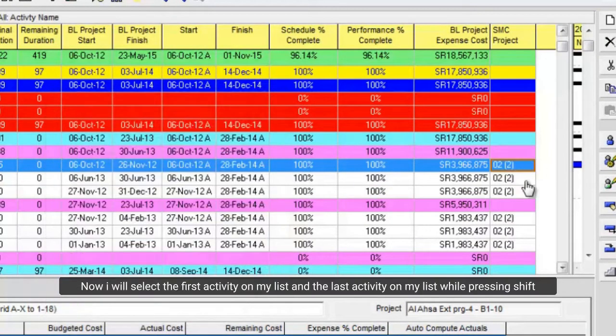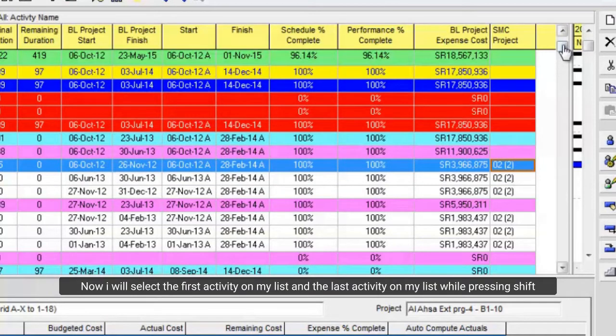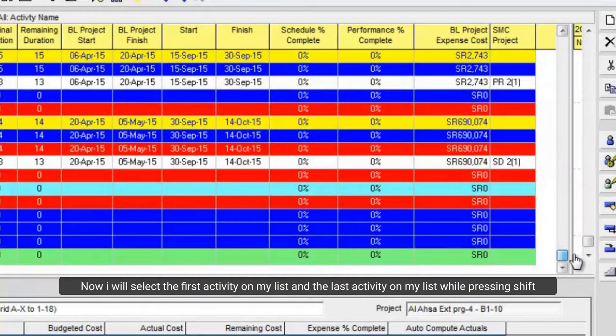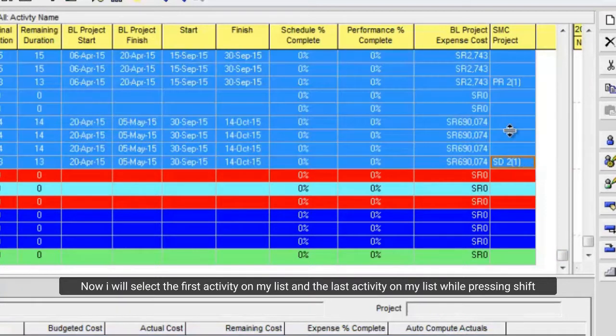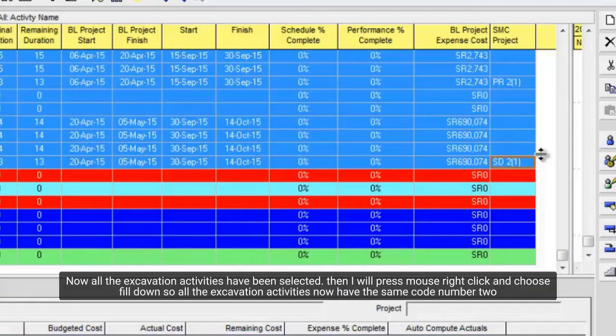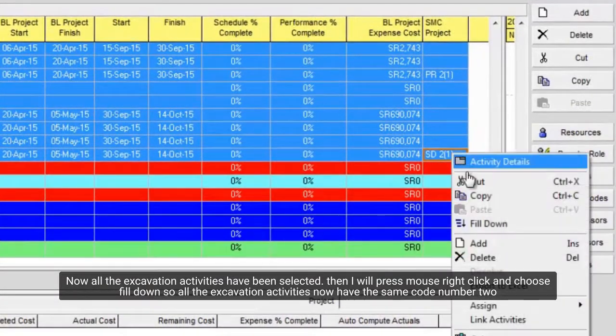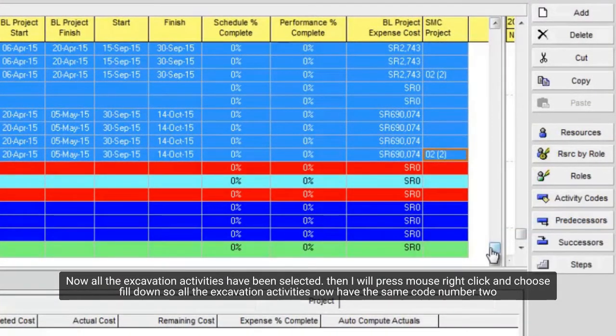Now the new column appears here, and I can assign excavation code which name is code 2. Now I will select the first activity on my list, and the last activity on my list while pressing shift. Now all the excavation activities have been selected. Then I will press mouse right click and choose to fill down, so all the excavation activities now have the same code number 2.